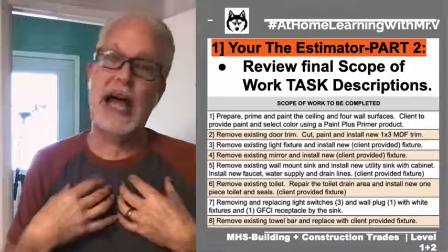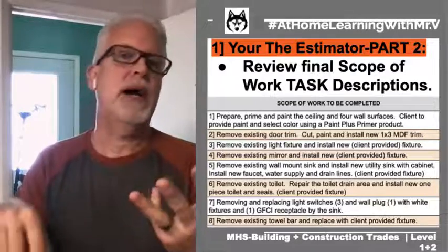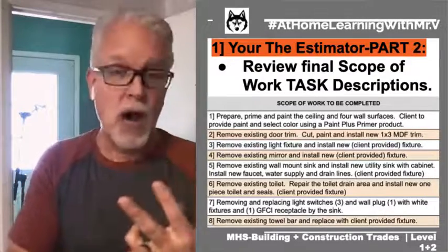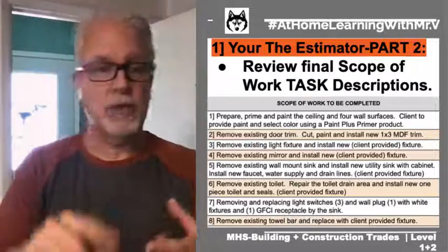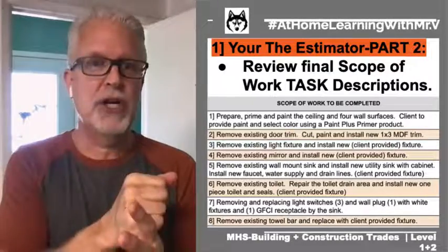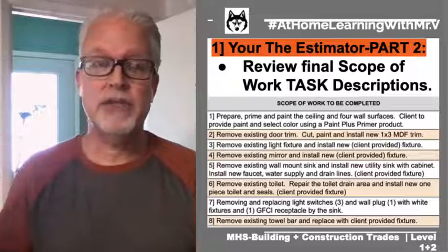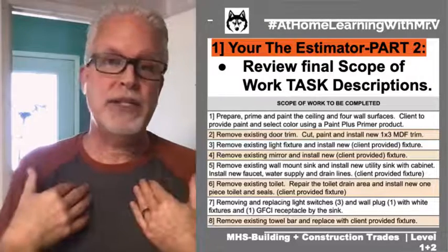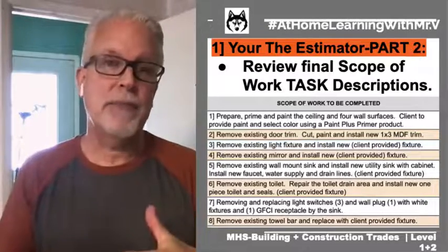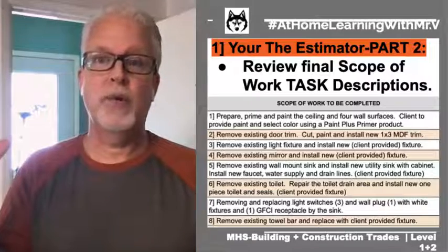So I can't be held liable for delays in the project, or I bought the wrong one, or it's the wrong color, or it's the wrong size, it's the wrong finish, because the client made the decision, they purchased it. My job as the technician is to install it properly to code, get it working, we're good to go.